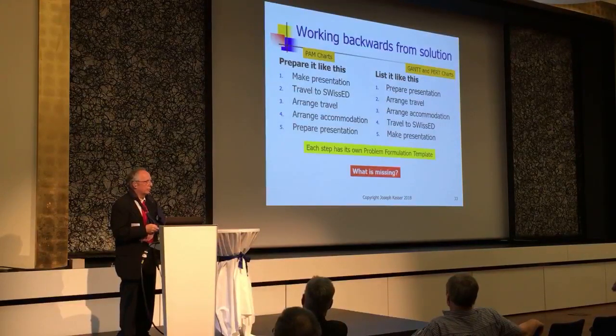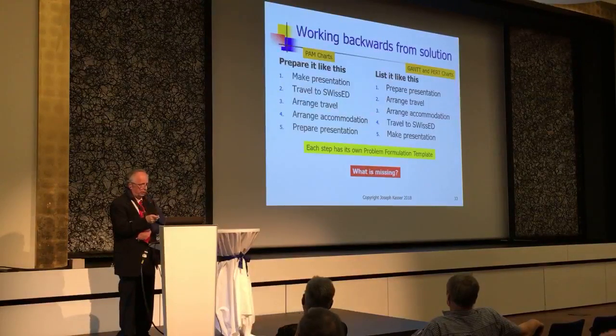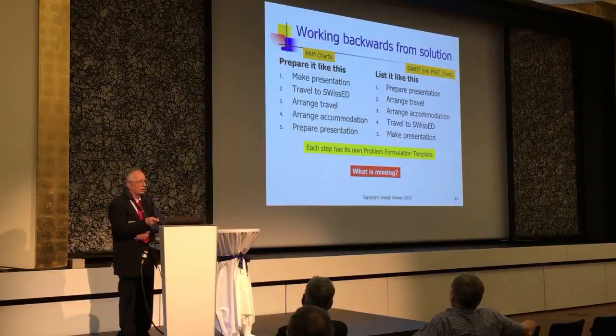First question you should come back with is, what's the context? Well, what's missing? How do I get home? According to this, I'm stuck in Zurich because there are no travel arrangements for returning home. This is the importance of scoping the problem, bounding your problem.